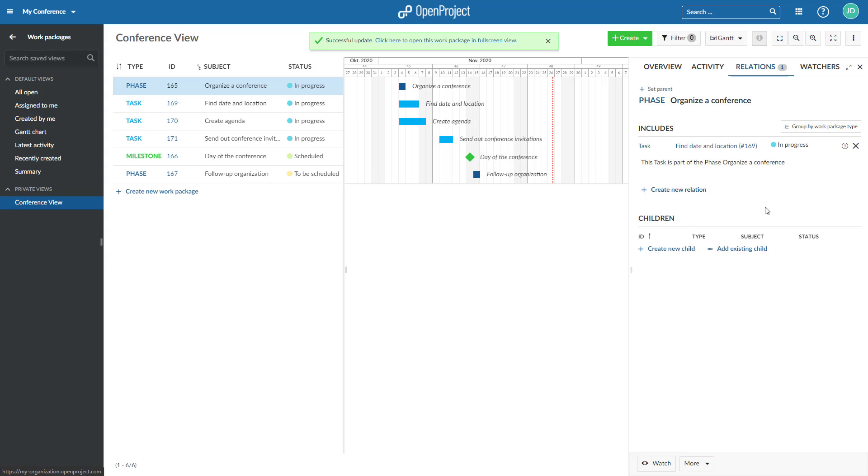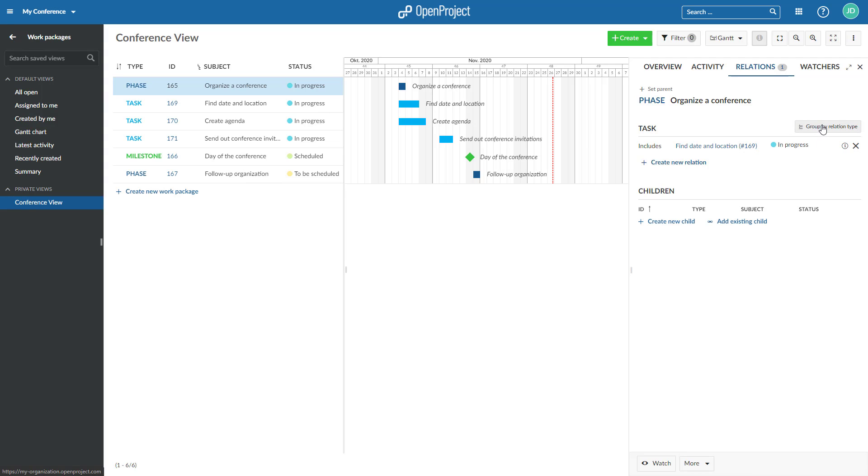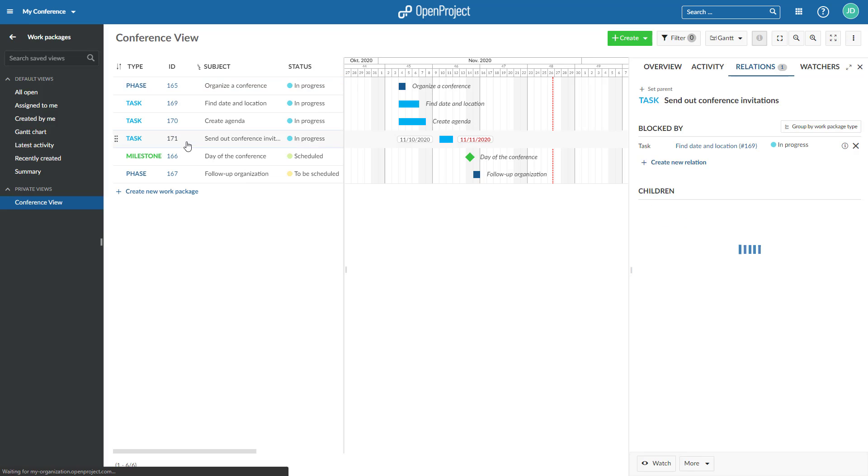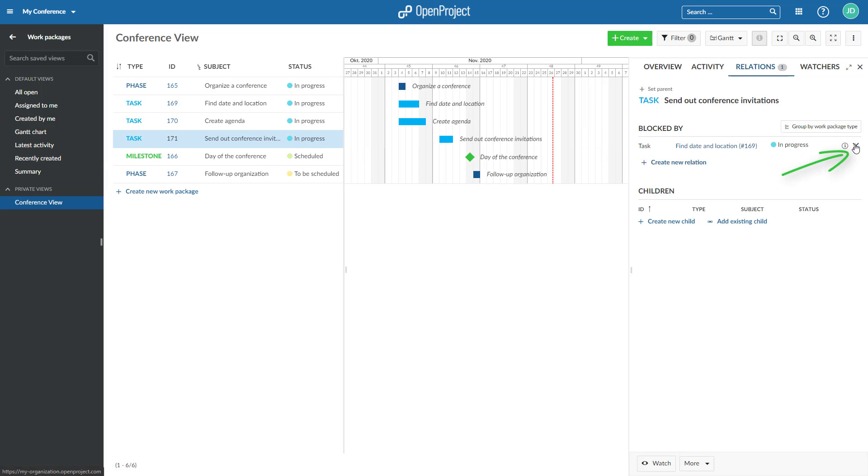To display existing relations for a work package, you can either group by work package type or group by relation type. Pressing the X will remove the relation for this work package.